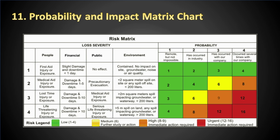The Probability and Impact Matrix uses the combination of probability and impact scores of individual risks and ranks or prioritizes them for easy handling. In other words, it helps determine which risks need detailed risk response plans. It is vital to understand the priority for each risk as it allows the project team to appreciate the relative importance of each risk.